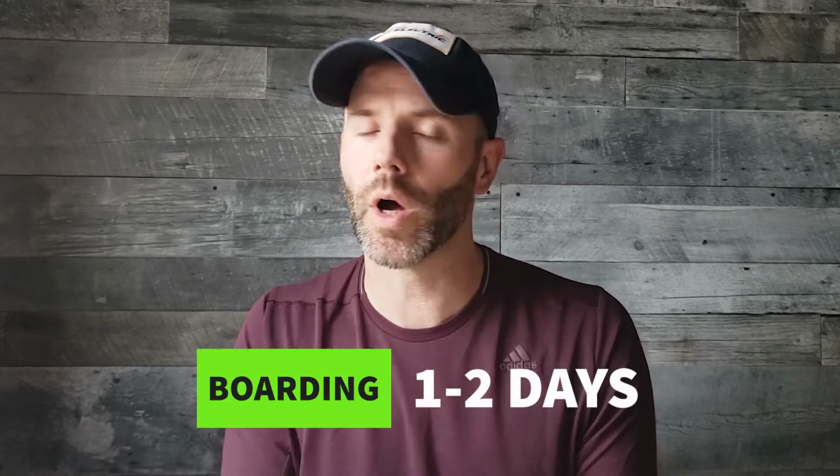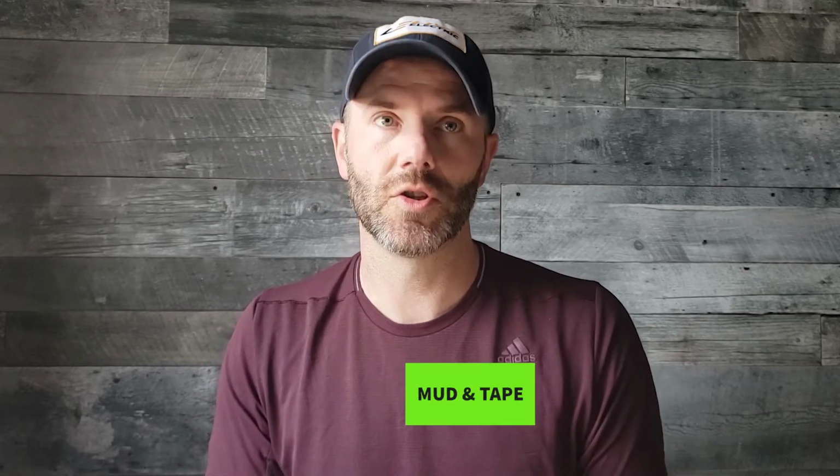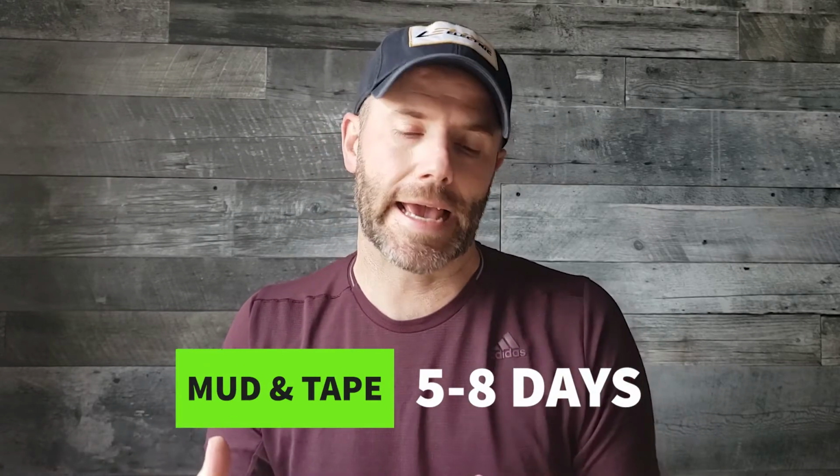Now we're going to get to the longest phase out of all of them, which is drywall. So there's going to be hanging board and taping. Because you got to get everything down, expect drywall hanging the board itself to take 1 to 2 days, with bulkheads and so forth. It's not an easy space to work in. So 1 to 2 days. And then your tapes are the longest thing to do. So there's multiple coats. You're looking at anywhere from 5 to 8 business days to get that done because everything has to dry. That's if everything goes well. We're going under the assumption that everything goes well.